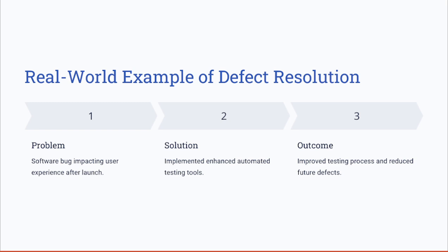So you as a project manager now need to take action by first analyzing its root causes to understand the reason behind the errors or bug that has impacted the user experience. After conducting a root cause analysis, it revealed that there are gaps in the testing protocols, leading to the implementation of automated testing as a corrective action. So you have identified the reason behind the issue, and now you understand its impact on the user experience.